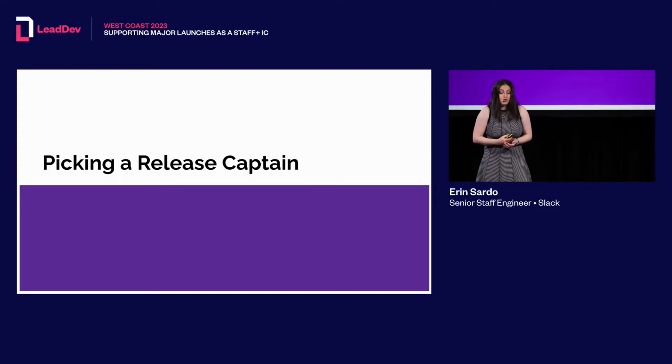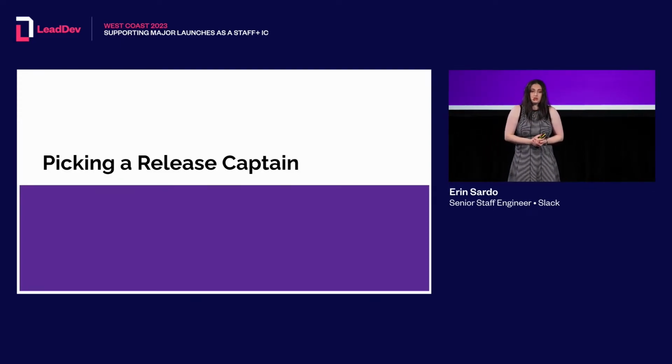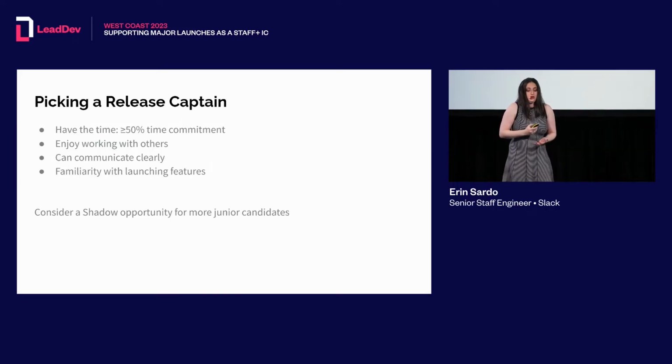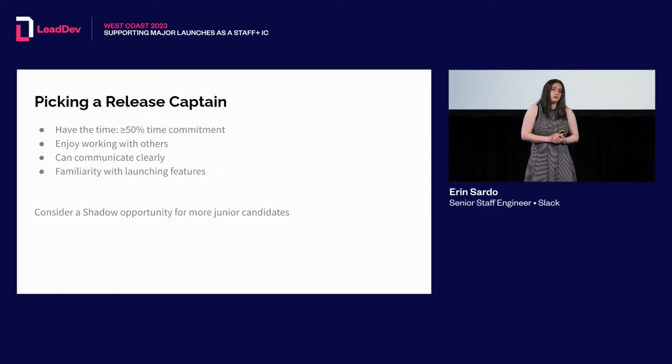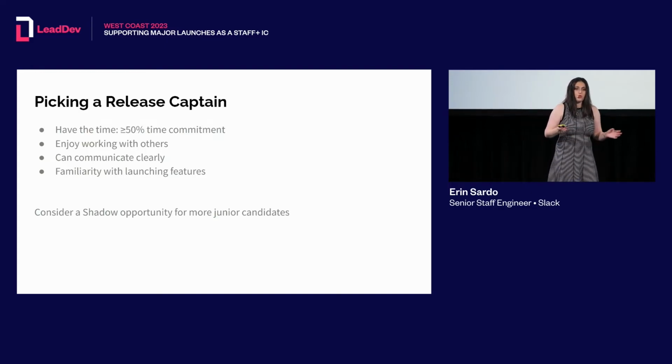And lastly, a quick note on picking a release captain, especially for the engineering managers in the room. Please, for all that is holy, pick someone who has time to do this. Do not pick the poor person who is the DRI for the major feature in the release to actually be your release captain. That's not nice. Just please don't. Pick someone who has time. In my experience, this is like 50% of your time, and that lasts like 2 months before the release, just corralling everyone into the right strategies.